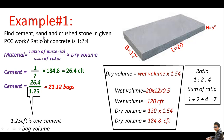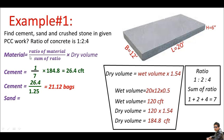Next, let's calculate sand (fine aggregate). You can use the same formula with ratio 2, but there's a shortcut: in a 1:2:4 mix, sand is simply 2 times the cement quantity, and coarse aggregate is 4 times the cement quantity. So if we have 1 part cement, sand is 2× and crushed stone is 4× — which is also 2 times the sand quantity. Does that make sense?